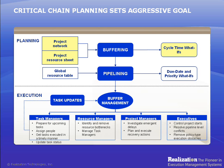Secondly, Concerto Pipeline Client performs multi-project scheduling and synchronization — that is, releases projects based on availability of the selected constraint. Typically the constraint is the resource with the highest load across all projects in the organization. Lastly, Concerto Web provides accurate task priorities across all projects that are determined by the buffer consumption calculated during daily buffer management runs.